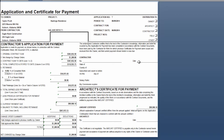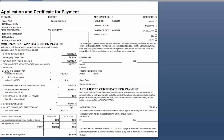Here you can see that we have our AIA G702 form — the application for payment — and this will automatically populate all of our information from Construction Suite: the owner, the contractor, the project, as well as an architect if we included one, the contract date, period-to date, and so on. You'll see that all of these lines have been filled in for us: the original contract sum, the net change by change orders, and the new contract sum to date; the total completed and stored to date pulled from the sum of the invoices we have included; the retainage on those invoices; the total earned less retainage; the amount from previous certificates for payment, which in this case is zero because this is our first one; and then from that less previous certificates for payment you will get the current payment due.